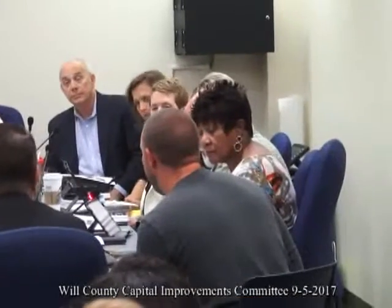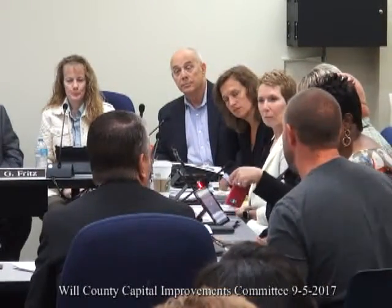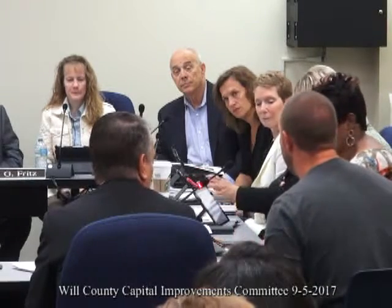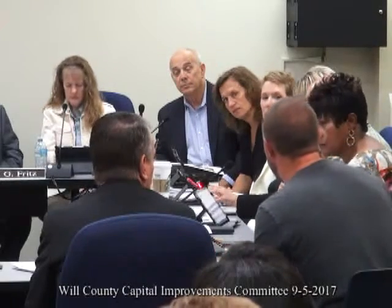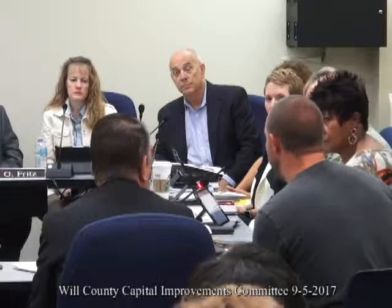One note, based on discussions with Joel and Leopardo, we decided to push all of the training of the facility staff until the final substantial completion. It just made sense from a logistics perspective to have a nice clean turnover, in case there were gaps. Let's just do training all at once at the end of the project. But there were certain systems that were given a basic understanding, because that portion of the building is turned over to the county, to make sure they are familiar with the systems and can operate those over the next couple months before we have that formal turnover.